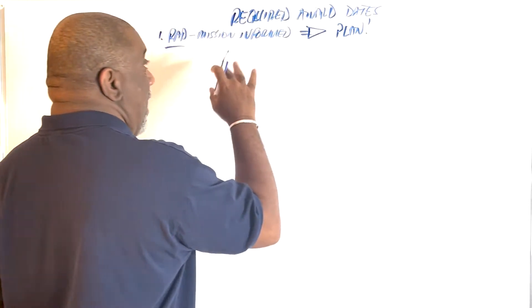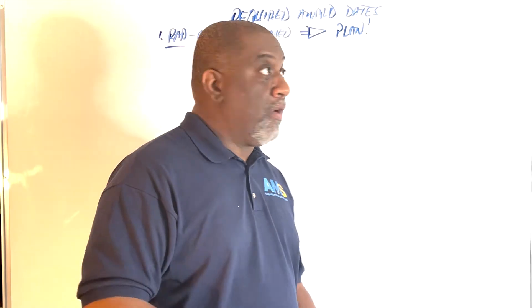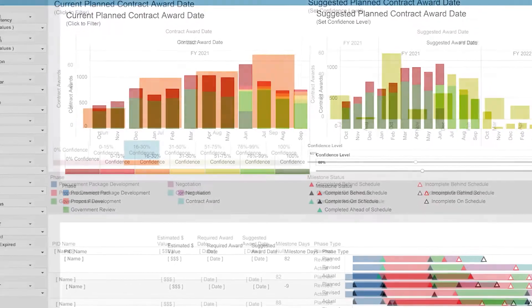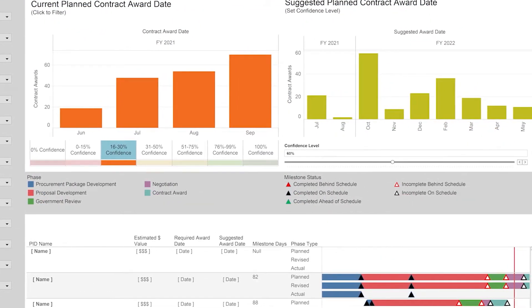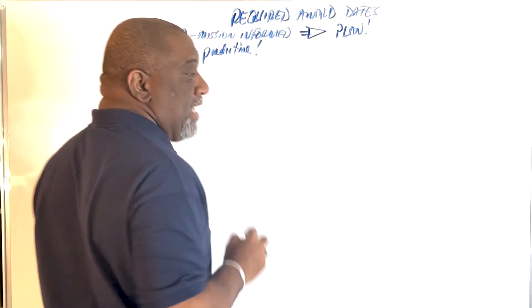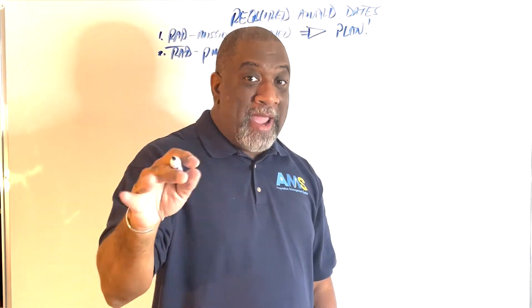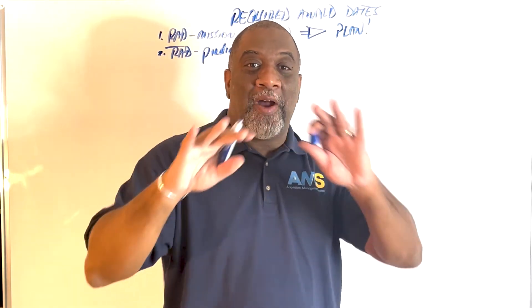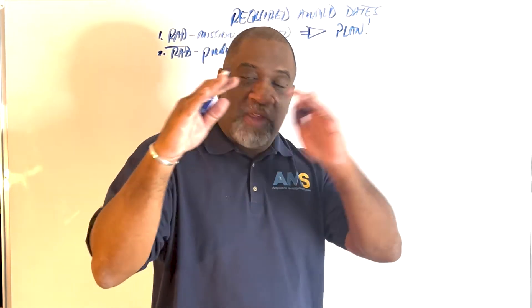Also know that inside AMS, that information is predictive. AMS tells you, gives you a sense of whether your required award dates are actually reflective of reality. It's predictive. The system lets you know, it's like, this plan based on this required award date, there's something wrong. There's something amiss, there's something misaligned, if you will.